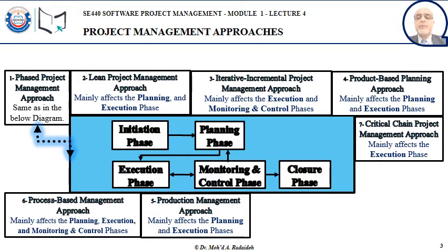Approach number 7, the critical chain project management approach. From the name, we focus in our scheduling and our planning on the critical things. Let's say during the scheduling, I have 2 staff or 2 members on the project who come from an external agency, a job agency or employment agency, and that employment agency puts a constraint on us that they are available only during April. So when it comes to planning, critical chain means the first thing I start to plan for or schedule for is the tasks that will be carried out by those 2 guys who come from that employment agency, and they need to finish all their duties during April. And I fix that on the schedule, then I schedule all the rest of the tasks accordingly.